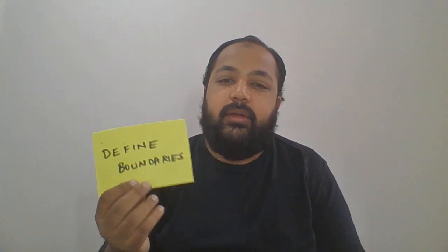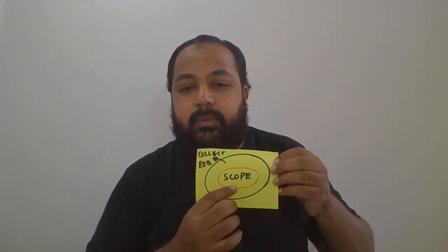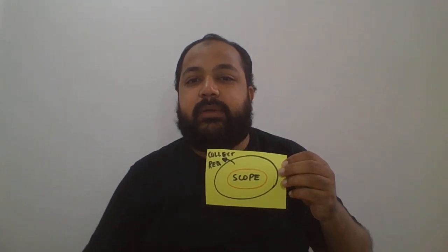Okay, so define scope helps you in laying out a boundary. You're going to define a boundary. Understand this. You collected a lot of requirements, let's say 100 requirements after the discovery phase, and now the project needs to be done in 6 months. According to your estimation, you can only do like 80 of those. Okay, the customer says just do me this 80. These are the important ones for me. So you're prioritizing the requirements, right? So your scope, defined scope, becomes a subset of collect requirements.